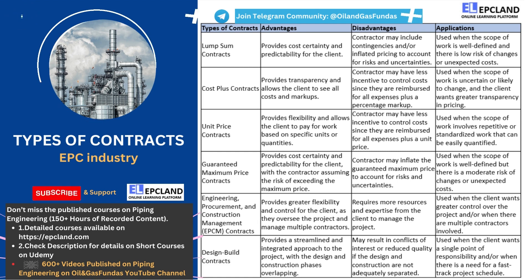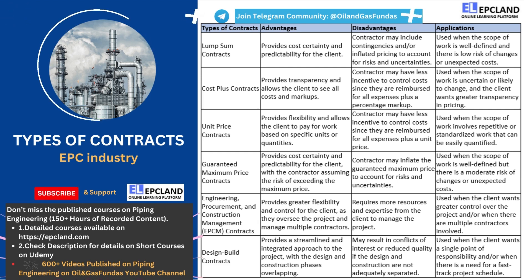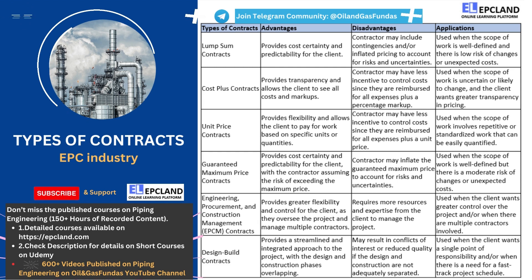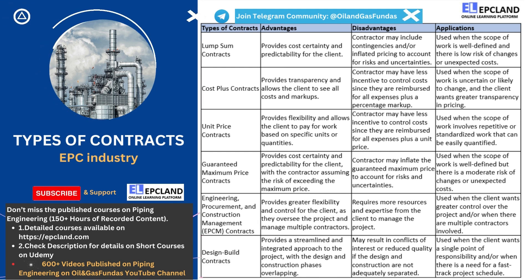Let's begin with the first one in the table. Lump sum contracts are a type of contract commonly used in the engineering, procurement, and construction industry. They are typically used when the scope of work is well defined and there is low risk of changes or unexpected costs. One of the main advantages of a lump sum contract is that it provides cost certainty and predictability for the client. With a lump sum contract, the client knows exactly how much they will be paying for the project and can budget accordingly.